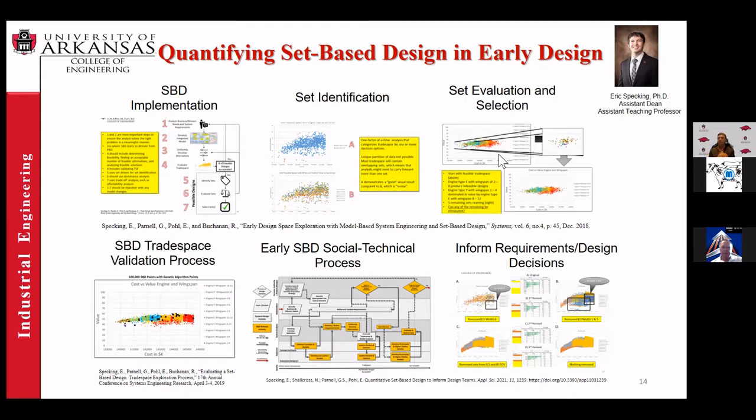We had an electric engine and a traditional mechanical engine. And what we found is the electrical engines, like majority of the design space were infeasible just because of weight requirements and everything else on other models. And so you could take that back to the engine team and be like, hey, we either need another engine or you need to change this design for the electrical engine to make it more feasible. And so that gives you some ideas of the possibilities.